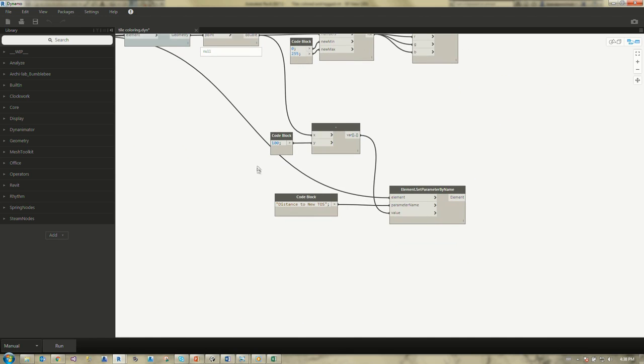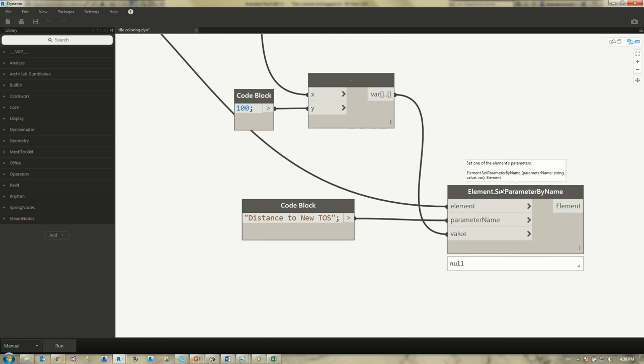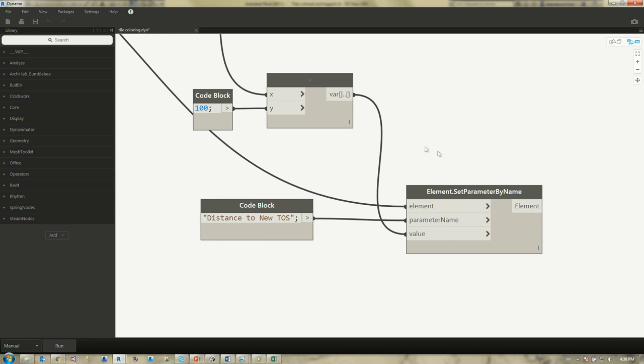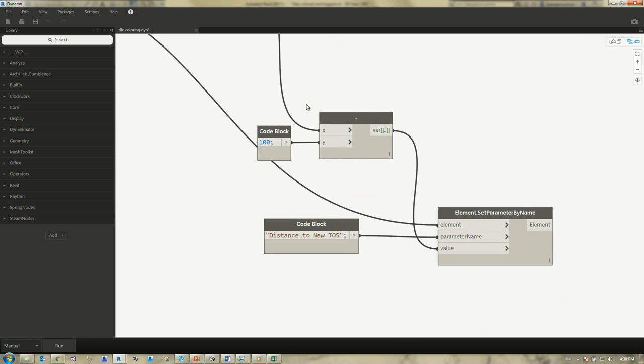At the same time, that Z value, we are subtracting and inserting that parameter into each of those tiles, the same way as in the last presentation where we're setting parameter value by name. We're taking each of those elevation points, which when converted into feet, we're supposed to be 100. We subtract that, and we know how far off each tile is from the ideal elevation. And with that stored in Revit, you could just do a little scheduling and figure out roughly how much concrete you would expect to order.